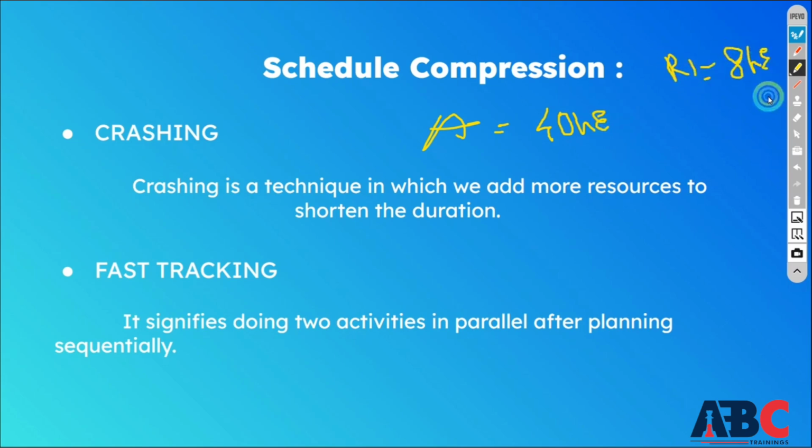If you consider this, if it will work for me, then how many days will it take? It will take about 5 days. 5 days total duration will be applied to it. But in the crashing technique, what we do is we add more resources to shorten the duration. Means to shorten the duration, we will add some more resources to it.